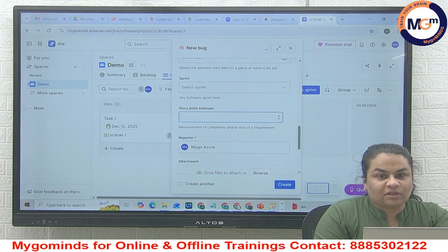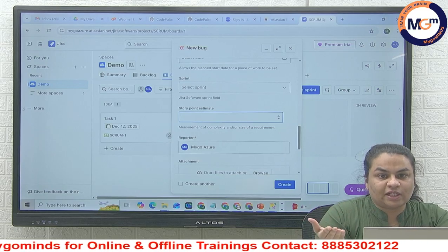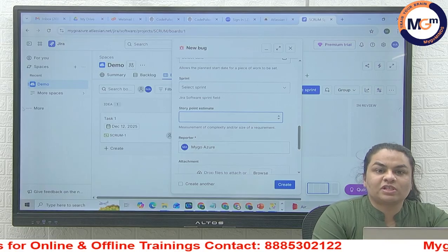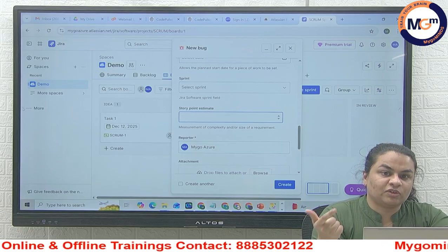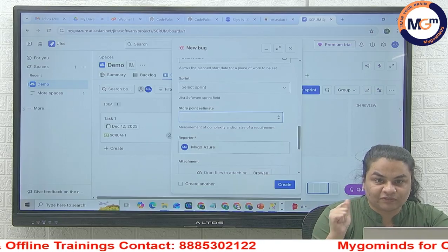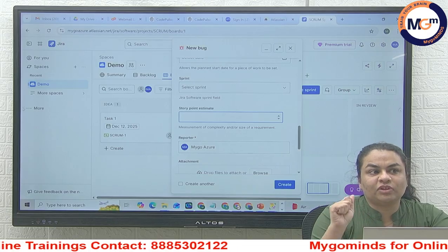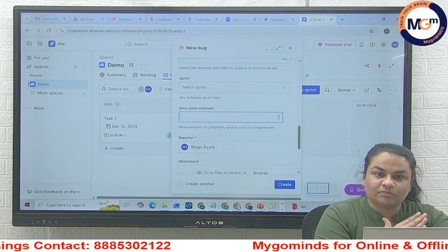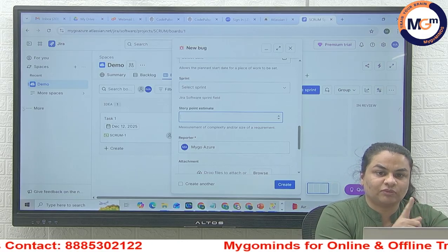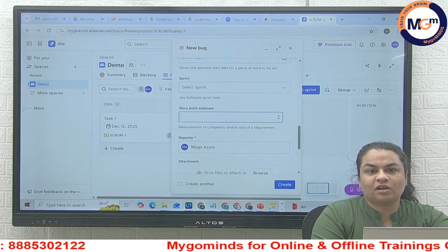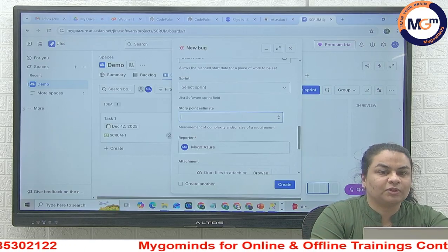It doesn't always happen on the deadlines or the timelines we're supposed to meet. What we will do is have a grooming session where we discuss why it is not happening. We will define the definition of done and refine it, and if the feature is lowest priority, we will push it back to the next sprint cycle or the next upcoming cycle. We will be looking at the priority.